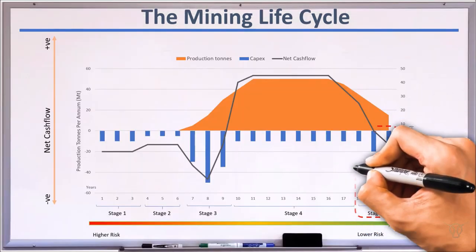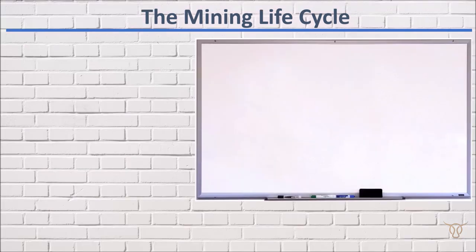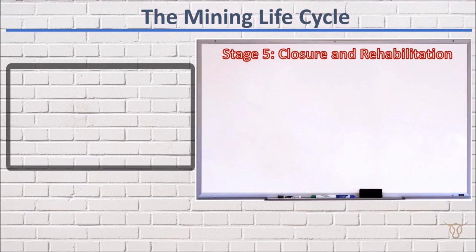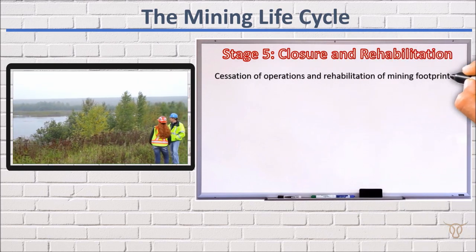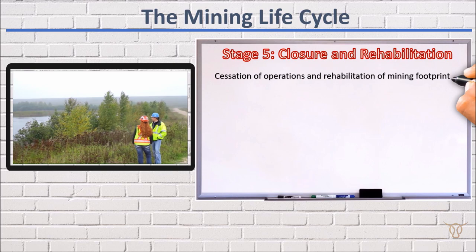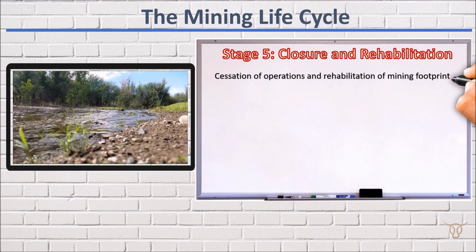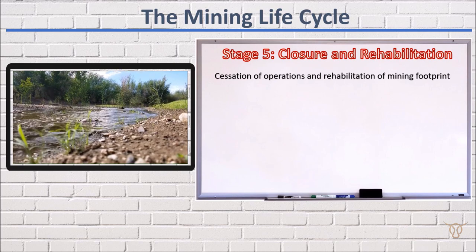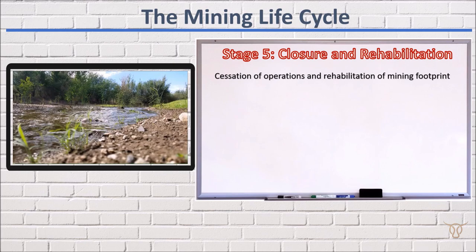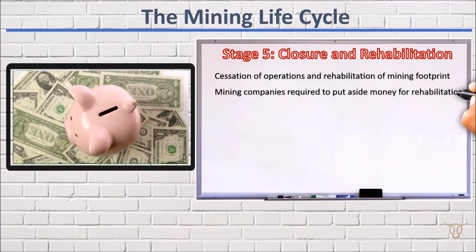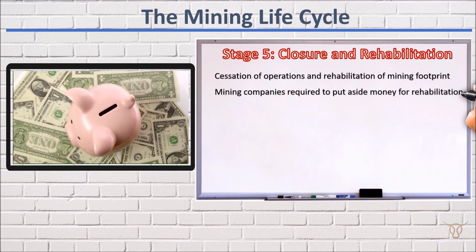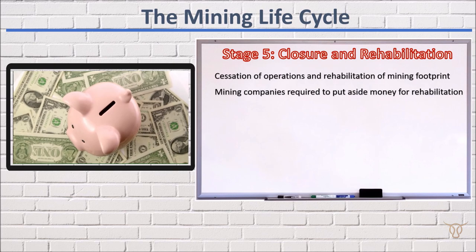Stage 5: Closure and Rehabilitation. As the mine reaches its end of life, sponsors begin to implement closure and rehabilitation plans. This involves the orderly cessation of operations and the rehabilitation of the mining footprint in order to restore the land to its previous state before mining operations took place. During their lives, mining companies would be required to put aside sums of money periodically to prepare for their eventual closure and rehabilitation stage.